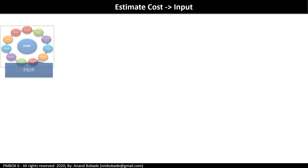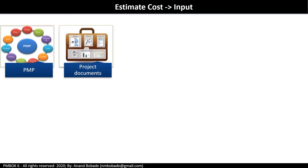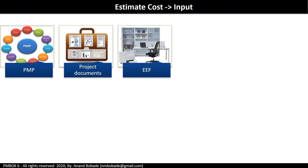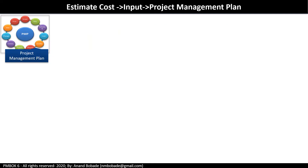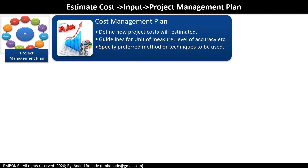Inputs include the project management plan, project documents, enterprise environmental factors, and organizational process assets. The key input from the project management plan is the cost management plan, which defines how project costs will be estimated. It provides specific guidelines affecting this process — for example, guidelines about unit of measure, level of precision, and level of accuracy — and specifies preferred methods or techniques to be used in estimation.